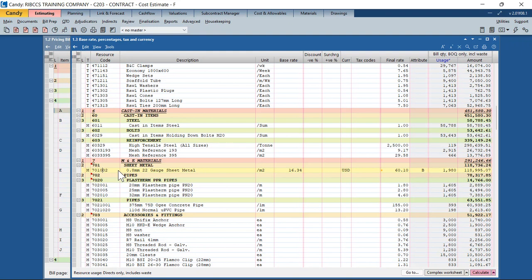Okay, all right. But I'm pricing this job in AED. Yes, I'm procuring these resources in US dollars, but I'm pricing this project in AED. So I want the AED equivalent, or the purchase price in AED, for me to be able to price. So what we've done here is you will notice that we've used the base rate.